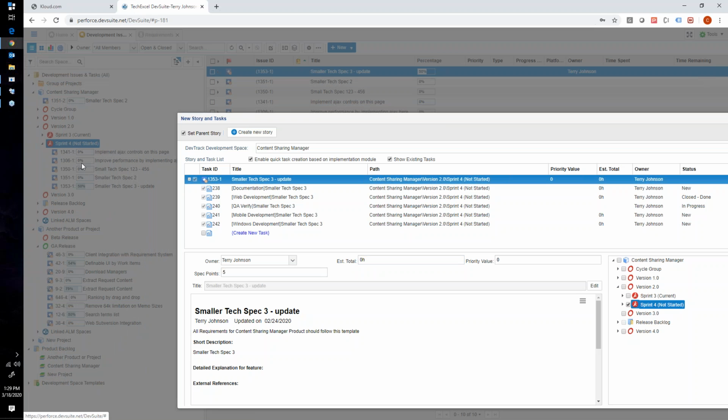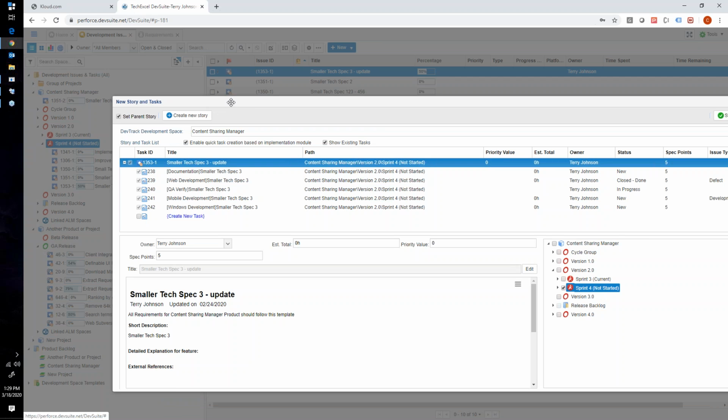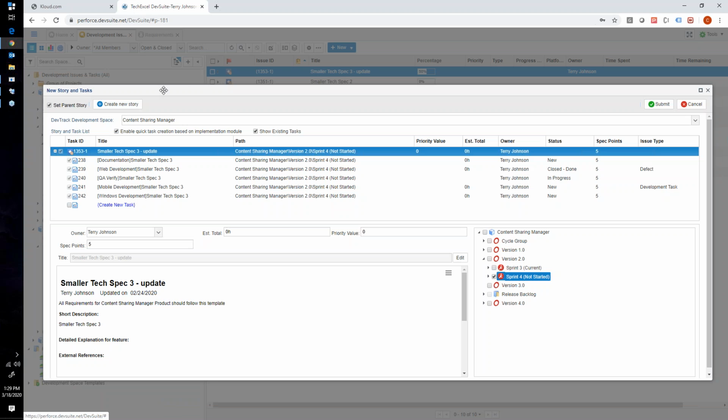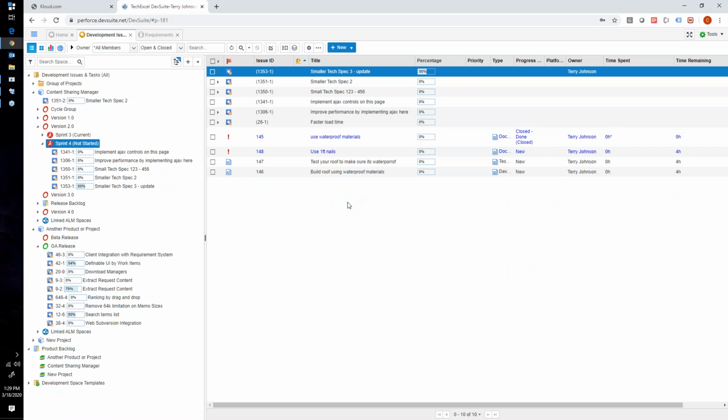So now, after all of these features that I want, these 5 features, I can go ahead and create the tasks for those. I can always do the same thing. So you can kind of see the system is very flexible. I had that option when I dragged and dropped into the sprint. I can do it afterwards, but my recommendation would always be to go ahead and do your sprint planning and then create your tasks for them afterwards.